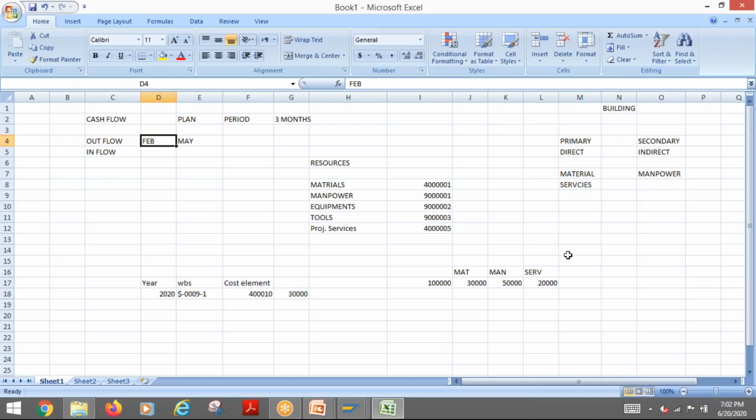So for that, the different way of fund arrangements will be there. One thing is they will do a credit negotiation with their vendors for some material and all those things they can get it. But when you're talking about manpower, which is not possible, you have to pay the salary, right? Every month you have to pay the salary. So if they don't have the inflow, then they need to look for an overdraft functionality from the bank. So there are so many kind of things happening behind this, in finance terms. So these kind of informations are important for them to take a decision making.